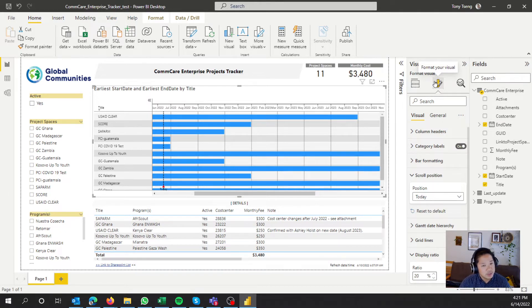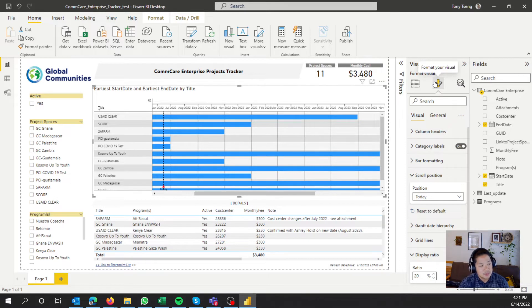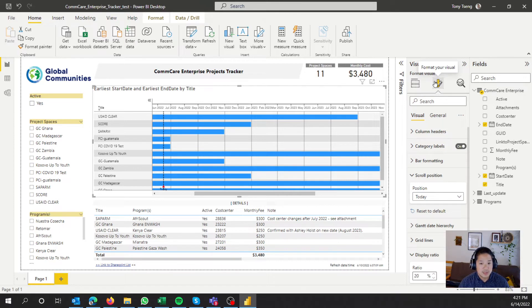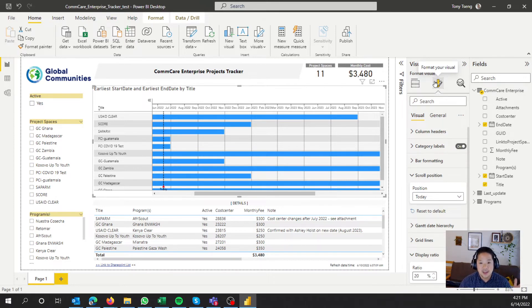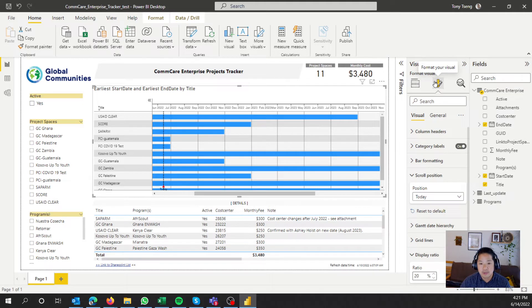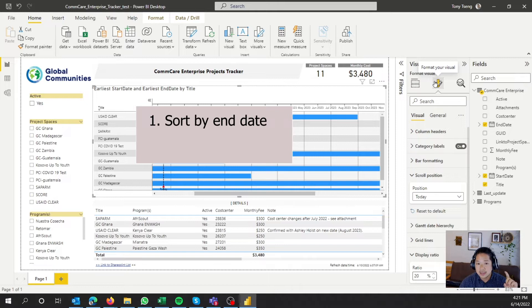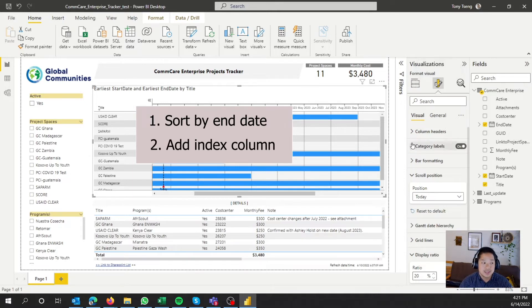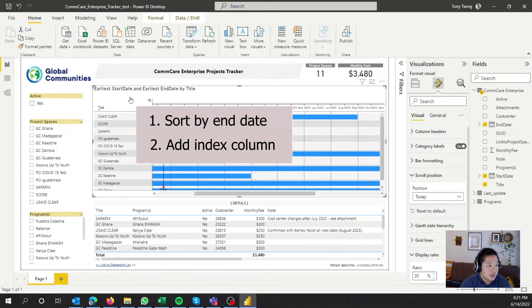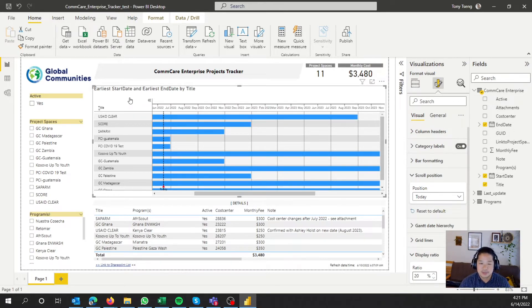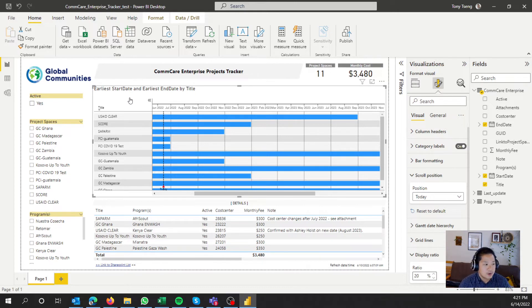So what we're going to do is create, go back into Power Query, and then transform the data, and then we'll sort it by the end date, and then we'll add an index column. So the order of operations will be sort ascending earliest to latest on end date, and then add an index. And then we'll use that index to create your new order of this. So it should make sense once I pop into the query editor.